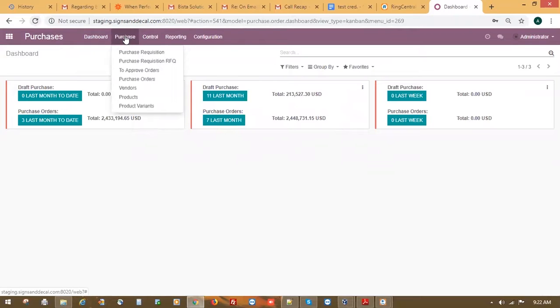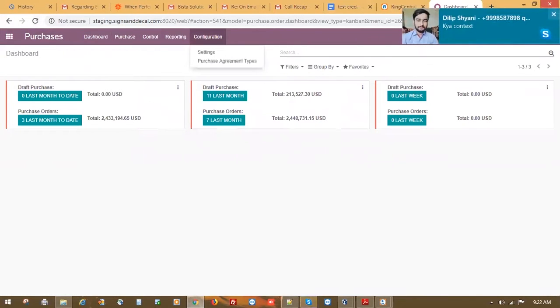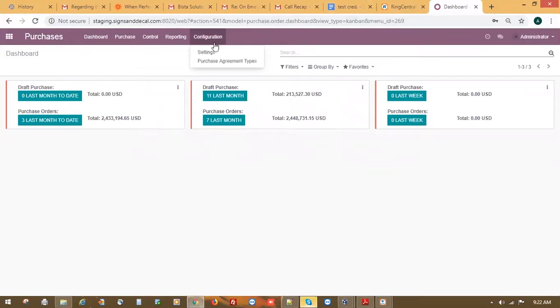Once we start, we are actually going to cover purchase requisition first. From that, we will create an RFQ, request for quotation. Once our request for quotation is validated, our requests are out for the sellers, and we validate any one supplier. So we will confirm that particular request for quotation. That will create a purchase order. This is the flow which I'm going to demonstrate right now.